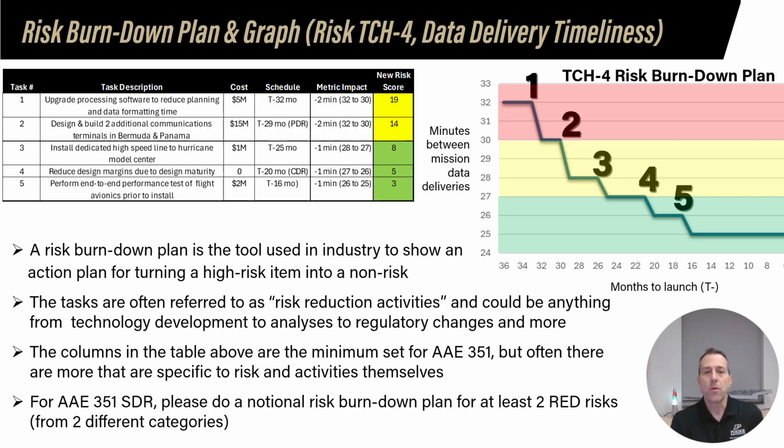Now, let's say we were a little exceeding in our initial estimates the 30-minute requirement, and we're at 32. And really, you should have 30 plus margin. So ideally, you'd be down at least 10% margin in the 27-minute time frame in your budget. But let's just say we're at 32 to start, okay?